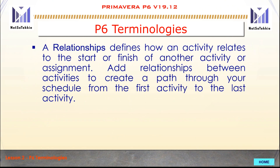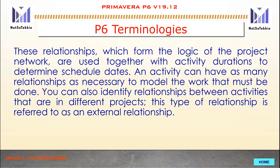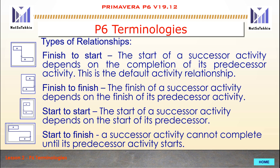Relationships define how an activity relates to the start or finish of another activity. Add the relationships between activities to create a path through your schedule from the first activity to the last. These relationships form the logic of the project and are used together with activity durations to determine schedule dates. An activity can have as many relationships as necessary. You can also identify relationships with activities in different projects, referred to as external relationships. There are four types of relationships: Finish to Start, Finish to Finish, Start to Start, and Start to Finish.